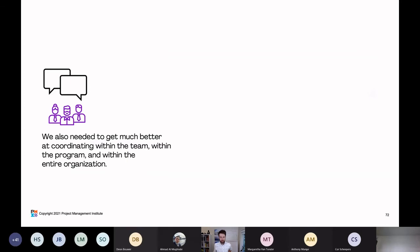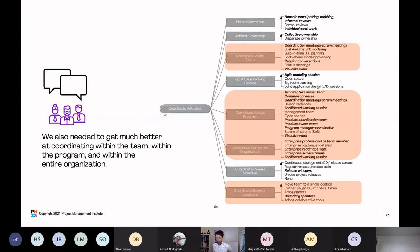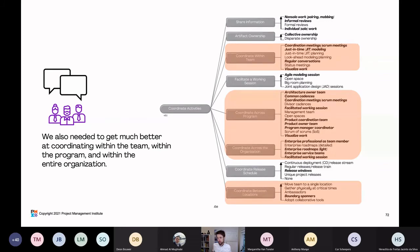The team also needed to get much better at coordinating within the team, within the program, and within the entire organization. They referenced the coordinate activities goal diagram and found many options. For coordinating within the team, they now have coordination meetings and better ways to visualize their work. For coordinating cross-program, they start to visualize work more and use common cadences — starting and stopping at the same time. For coordinating between locations, they adopted collaborative tools like Microsoft Teams, which they hadn't used before but needed for the work-from-home style.